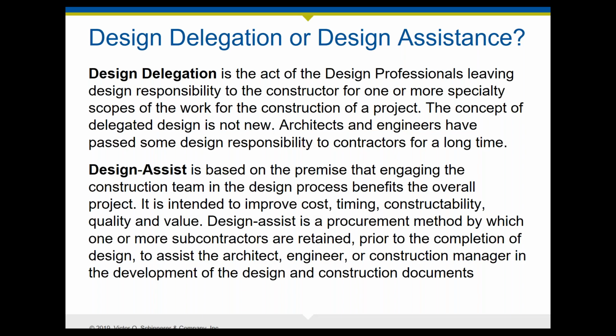Now, design assist is a different kind of idea, and that's really the idea of early contractor involvement, engaging members of the construction team in the design process, and that is supposed to benefit everyone. It certainly benefits the contractor or specialty subcontractor because they're involved early. They get to have influence over what the design is going to be, and often the design then represents the best way that they're able to carry out something. So where delegated design is really just a flow down of responsibility, design assist is really a different kind of procurement method.